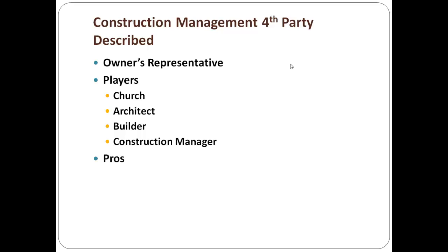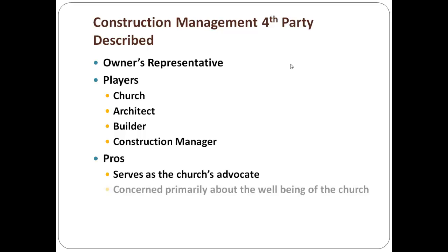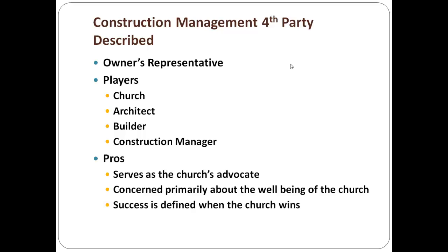In big projects, normally not church projects, but in really large, complex projects, owners will hire a construction manager, fourth party, and he is there to serve in certain ways. He serves as the church's advocate, just like pure agency and at risk. He is concerned primarily about the well-being of the church. Success is defined when the church wins. So again, he is still serving solely the interest of the church, but he is having to take care of the architect and the builder as well, because he doesn't want the relationships to break down.